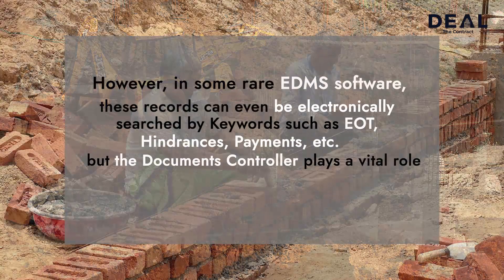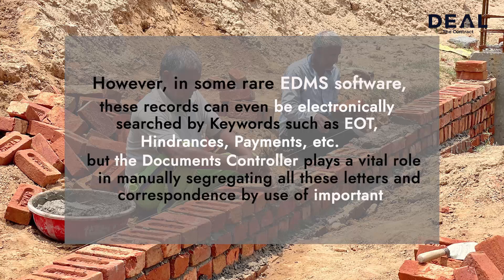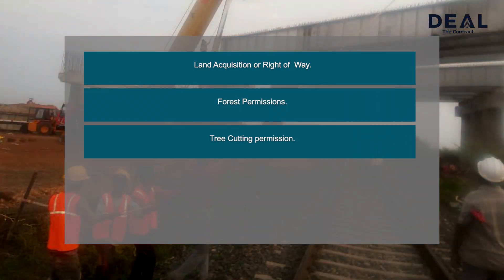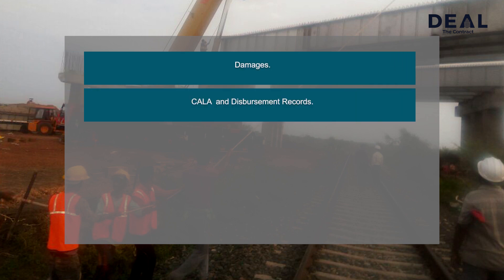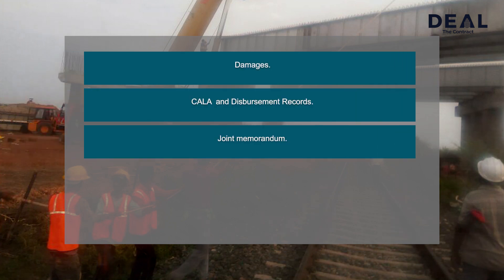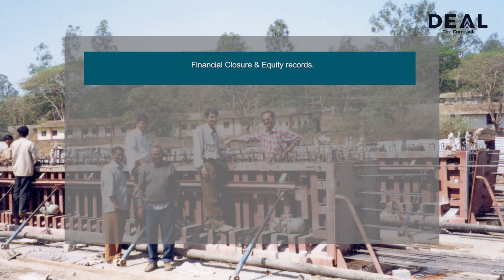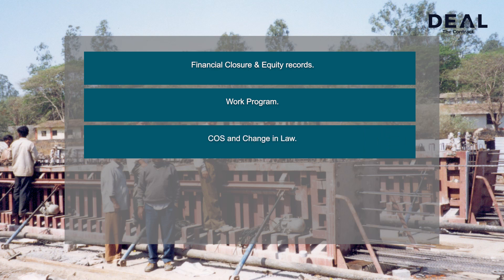But the Documents Controller plays a vital role in manually segregating all these letters and correspondence by use of important search keywords which are: land acquisition or right of way, forest permissions, tree cutting permissions, payments and related milestones, utility shifting, damages, Kala land disbursement records, joint memorandum, extension of time, lenders approval, financial closure and equity records, work programs, change of scope and change in law cases.